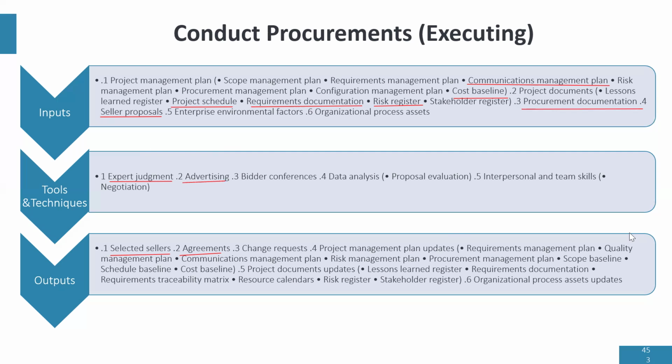A bidders conference is where all your vendors meet with the buyer. There's a disadvantage to a bidders conference, but there's also an advantage. Now, a bidders conference is used when you are dealing with a very complex project, and it allows sellers to ask the buyer questions.